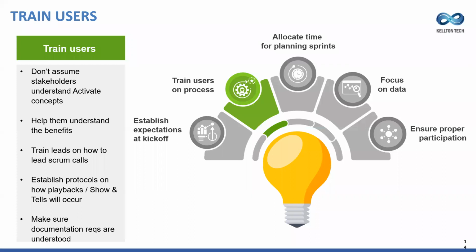People literally, if everyone was together, stand up and talk about what they're talking about. But in COVID, obviously, it's over the phone or Zoom or whatever. But you really need to manage that so that if additional discussions are needed, those just become activities within that day that has to take place. They're not really meant for those daily status calls. It's just meant to, hey, listen, I need to talk to you about this. I have a little issue I need to discuss. That becomes offline and then reported the next day.